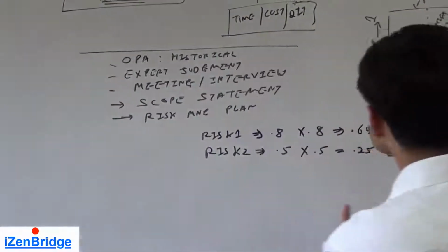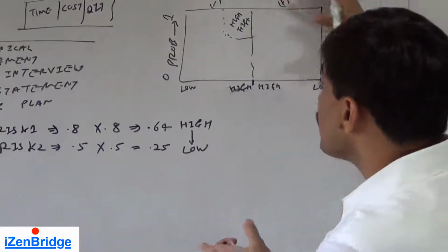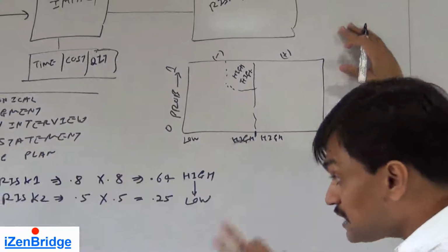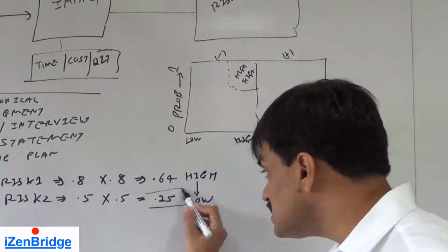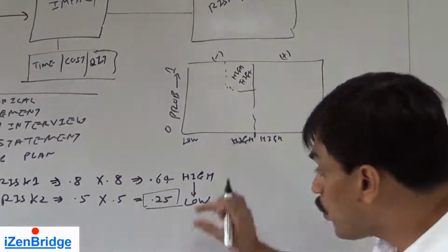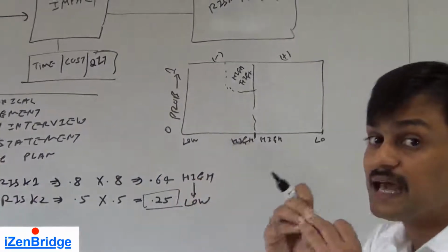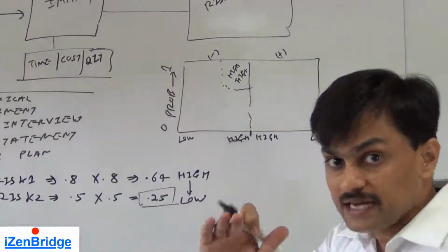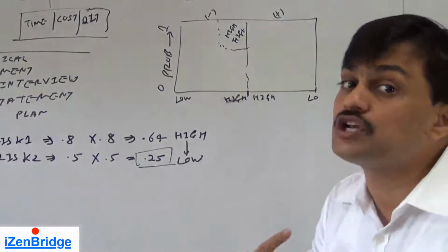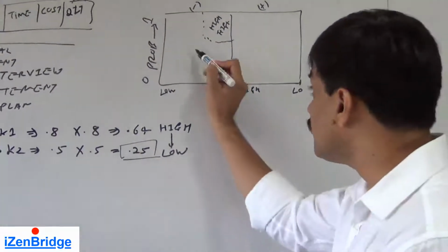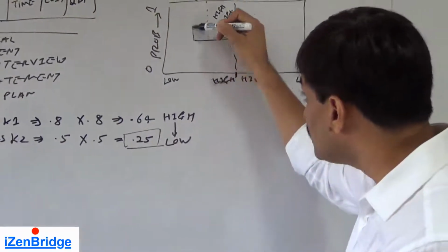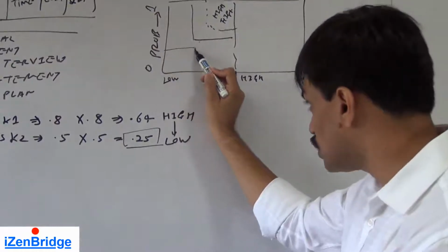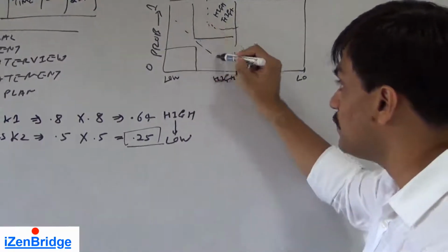So in our risk management plan, we can have a risk probability and impact matrix which can tell us when we should consider a risk high, at what particular number. If we get to that particular number, which is also called risk exposure, after that is a threshold, my organization's threshold. So we identify that threshold, and risks beyond that threshold we categorize as high. Then we can also have a risk threshold for low risk, and the rest may remain at medium.